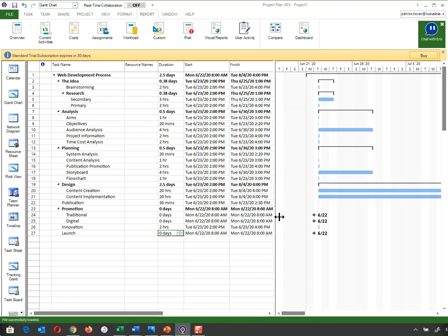But just to complicate issues a little bit, just say I live in a very small house. Can I multitask? Can I get the glass and switch on the tap at the same time? Yes, I can, okay? Everyone will agree that I need to put the glass underneath the tap before I switch it off in order to get a glass of water, okay? So certain things have to happen in a certain order, okay? And it's the exact same thing with this project here. It's the exact same thing with every project.